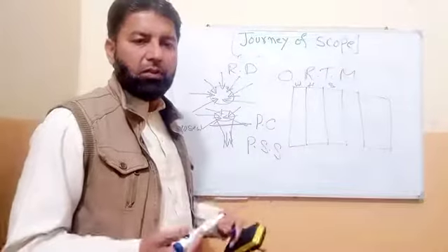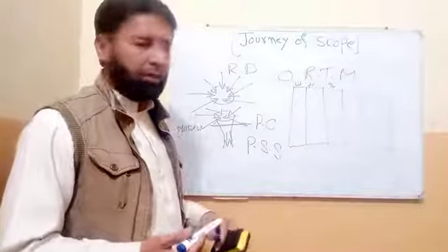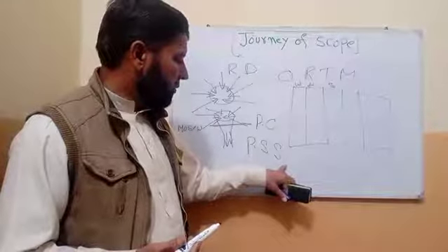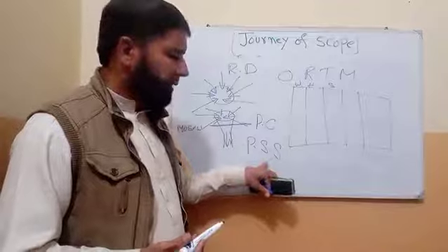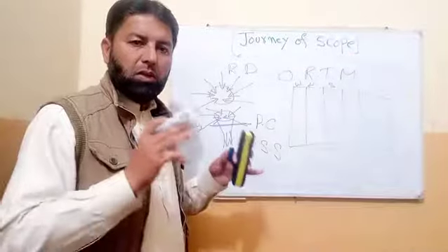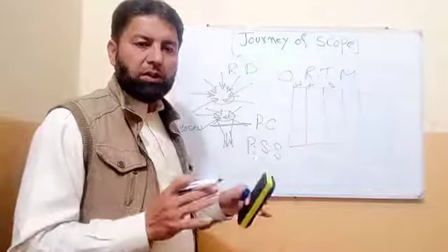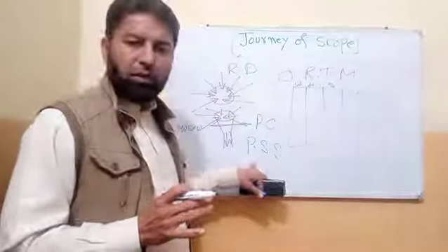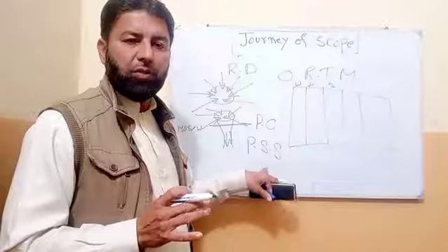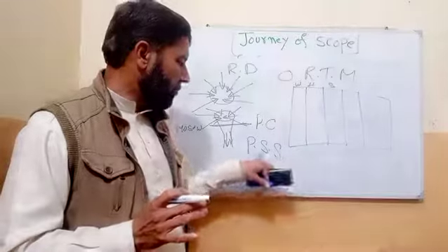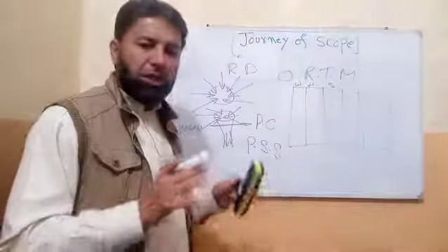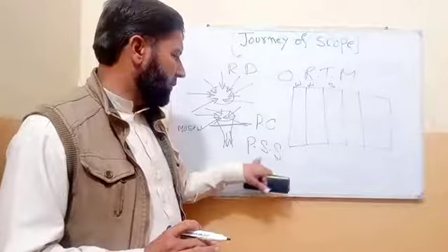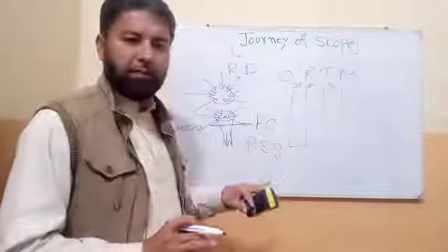We will make a house of 200 square feet. But here we will make a house of 200 square feet having 4 rooms, 2 washrooms, how many kitchens there are, and which tile we are using. Also, the color of the tile should be mentioned in the project scope statement. Each and everything regarding scope is mentioned in detail in the project scope statement.